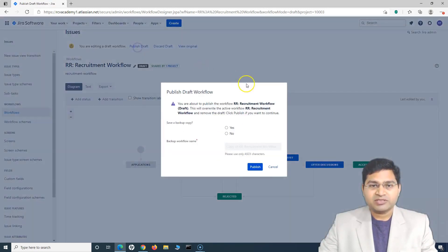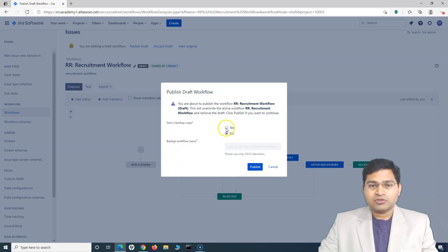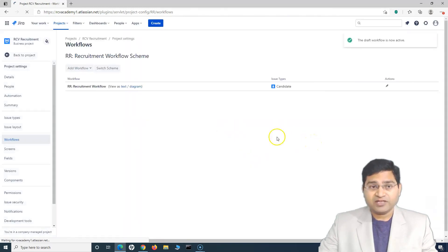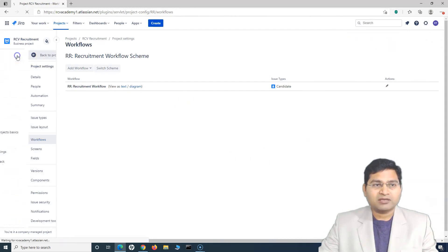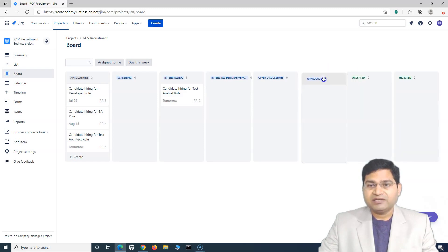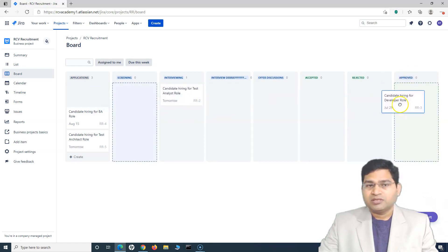If I simply click on 'Publish this draft', it will give a window to save a backup copy — you can say yes or no depending on whether you want to save it. I'll say no and publish. Now this updated workflow will take effect. Going back to the project board, you can see the renamed 'interview debrief' text has been changed, and the new 'Approved' status has been added, which accepts all transitions — so issues from any status can be moved to approved.